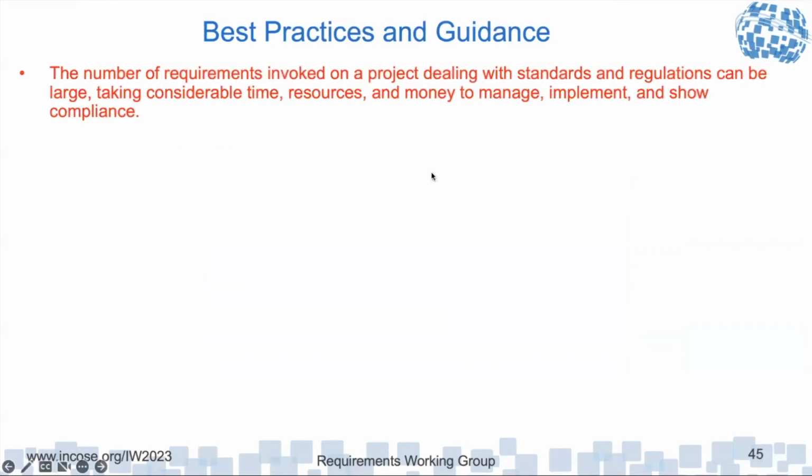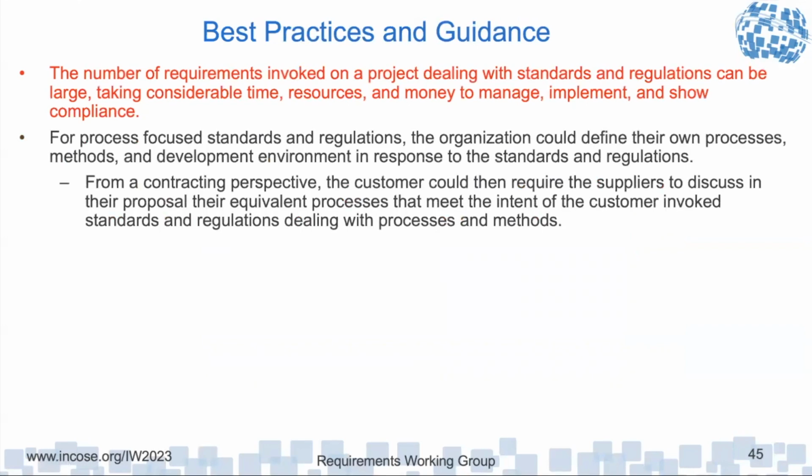Now, the number of requirements invoked in project-dealing standards can be large, taking considerable time, resources, and money to manage, implement, and show compliance. For process-focused standard regulations, the organization can define their own processes and methods and develop an environment in response to the standards and regulations. And like I said before, from a contracting perspective, the customer can then require the suppliers to discuss in their proposal their equivalent processes that meet the intent of the customer-invoked standards or regulations dealing with the